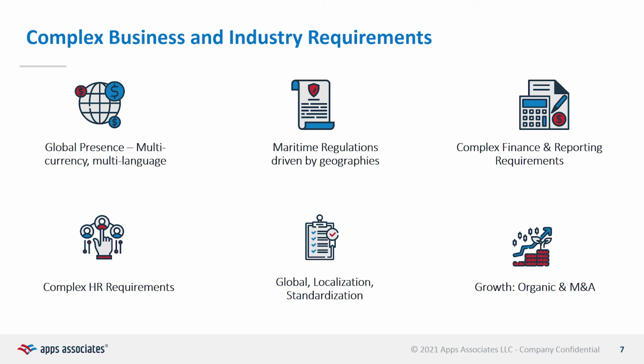So at that point, the focus really became, what are the priorities for go live? And those really were, can we generate invoices and can we pay our people? We looked at that as core to be able to complete our go live. If we said yes to that, then we decided that we were actually going to complete our go live on schedule, which we did.